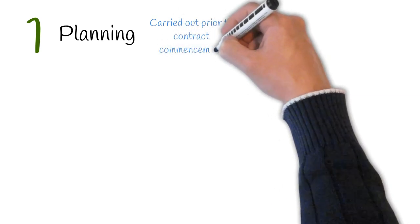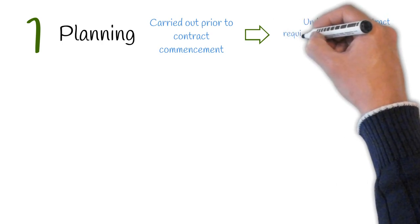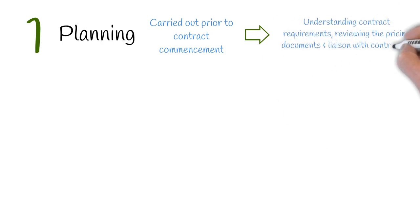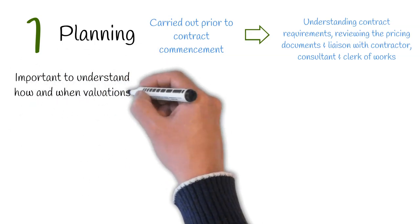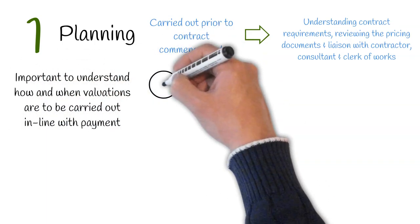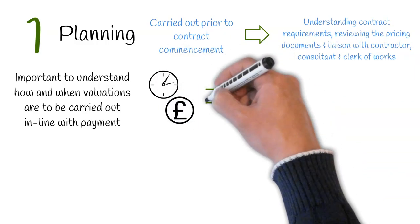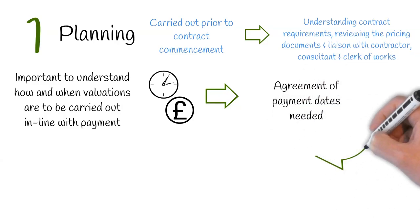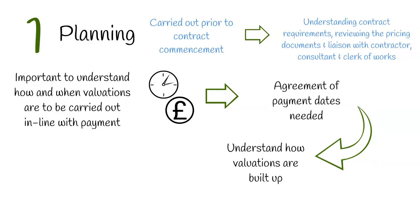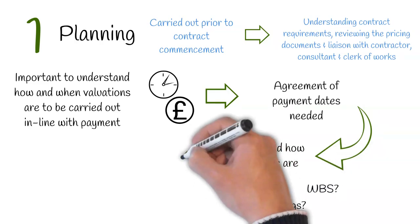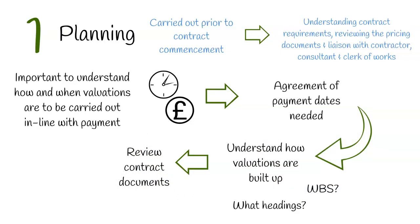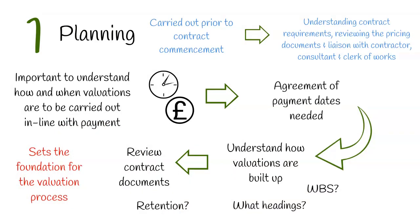Let's start by looking into Stage 1: Planning. This is carried out prior to the contract commencement and includes understanding the contract requirements, reviewing the pricing documentation, and liaison with the contractor, consultant and clerk of works. During this stage it's important to understand how and when valuations are carried out in line with the payment process. This means there needs to be an agreement, if not stated in the contract, of the schedule of payment dates with the employer, and an understanding of how the valuation needs to be built up under various headings, such as whether there is a works breakdown structure to adhere to. The contract documents will need to be reviewed, and factors like retention considered. Ultimately, this stage needs to lay the foundation for the interim valuation process.